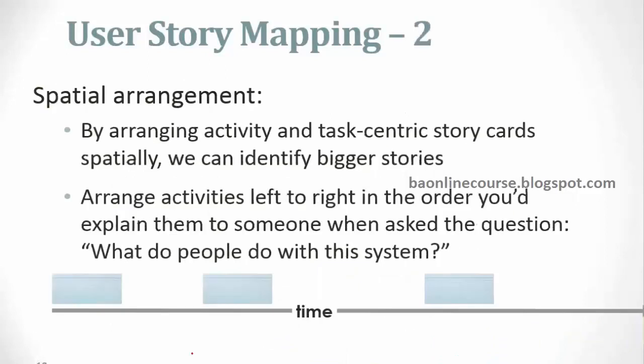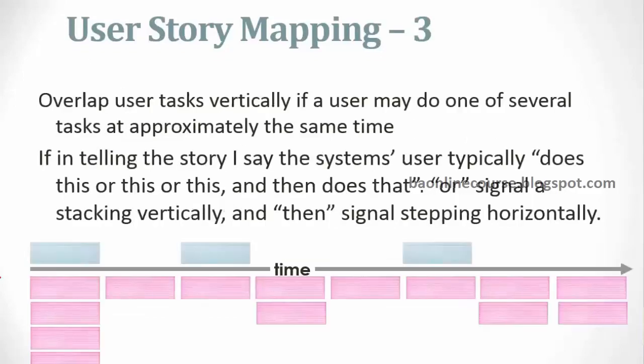First step, you are arranging all the activities in a line, usually if possible in a time-bound manner, but it need not be in chronological order, right? Sometimes some of those activities could be simultaneous or not related in time, but you can place them. So broadly, at a high level we are figuring out what all features the system should deliver. Then we break down each one of them into smaller ones.